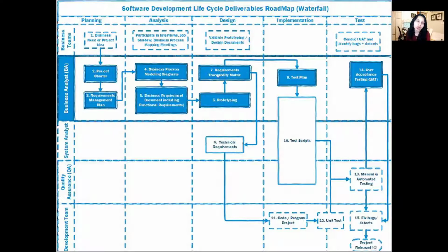For example, you need to plan out exactly what your project is going to look like. You have to define scope. All those requirements have to be defined in the analysis phase. We have to design what this product looks like, and then coding can start. Typically coding itself can take anywhere from 2 to 3 months, depending on the size and complexity of your project. And then you go into something called user acceptance testing.